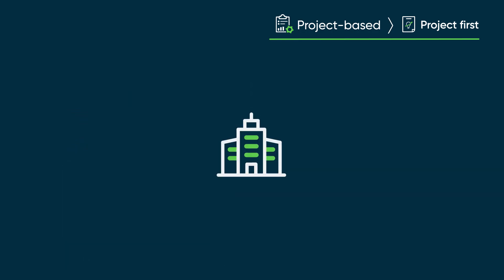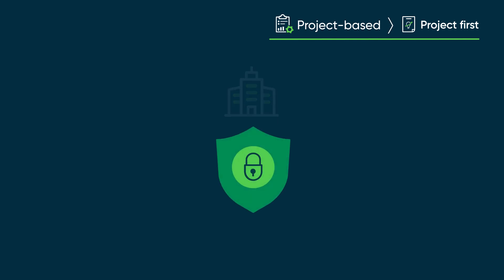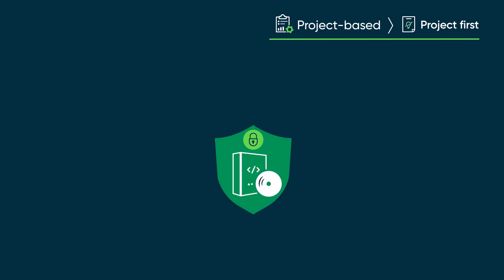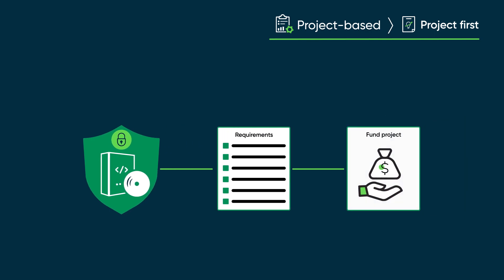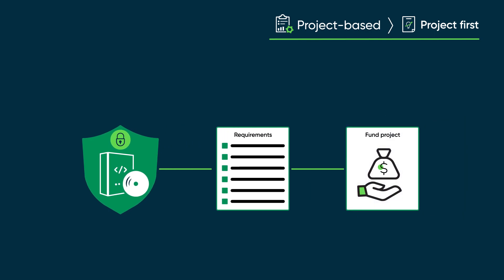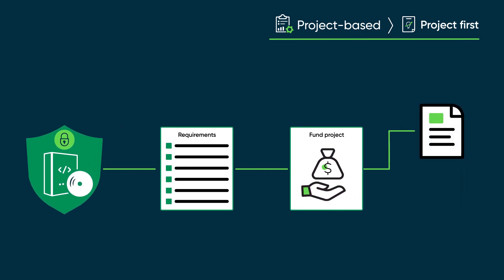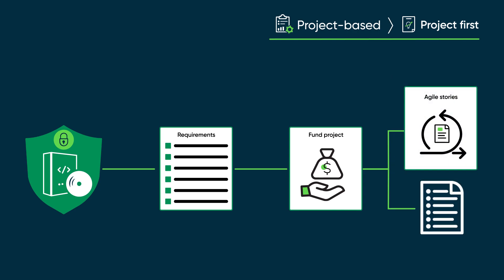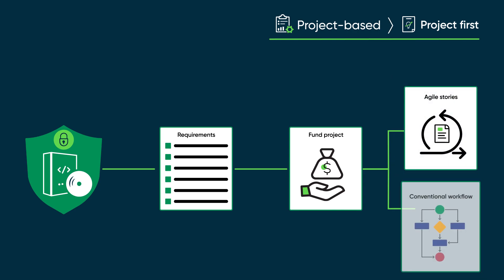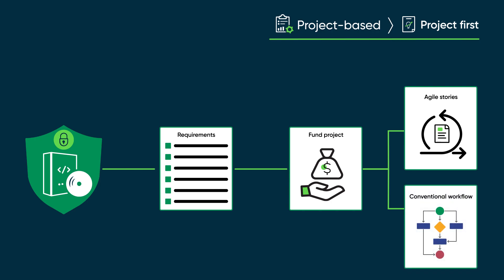For example, a company might identify a need to enhance the security features of its software. It would then collect initial requirements, create and fund a project, develop more detailed requirements in the form of Agile stories and project tasks, and ultimately implement the stories using Scrum techniques and execute the tasks using conventional workflow.